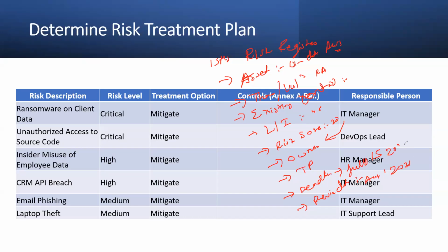2025. So like this, you can create a risk register entry for every risk that needs to be registered in this document. You can give the full information: what needs to be protected, what the risk level is, what current measures are in place, what the score is as per the defined criteria, what possible actions you are going to take, who will be the responsible person, what the steps are to mitigate or reduce the risk, what the targeted date for implementation is, and when there will be a reassessment.